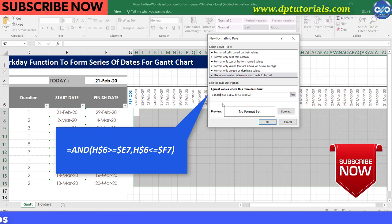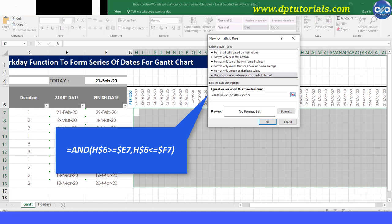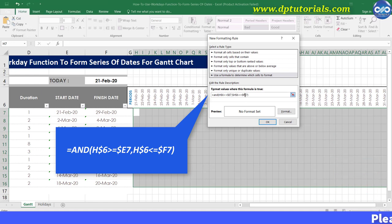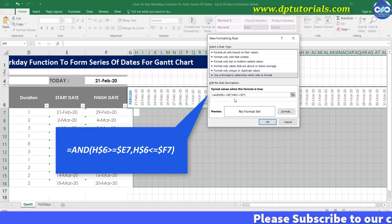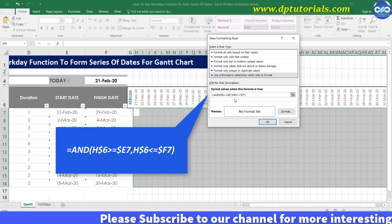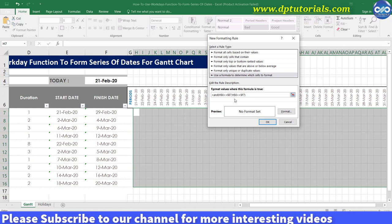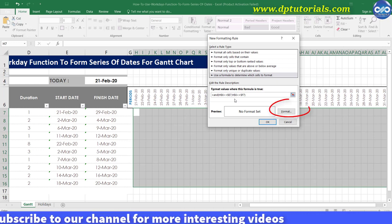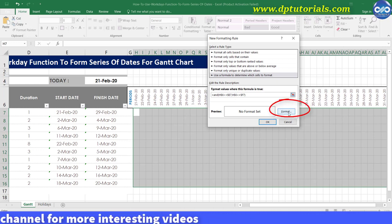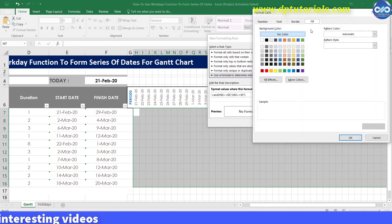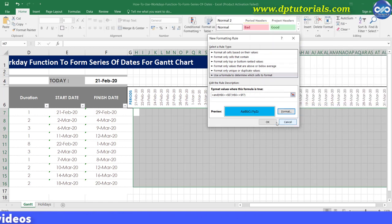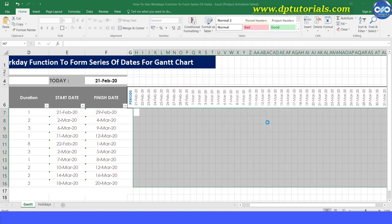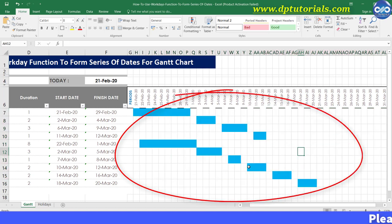Now remove dollar sign on the left side for the H cells, H6 cell and remove dollar sign on the right side for the E and F columns. So you need to adjust this locking with dollar symbol like this. And then click on format and select a fill color like a blue color here. Now click OK and again OK to confirm. Now you will see the Gantt charts based on our start and finish dates like this.